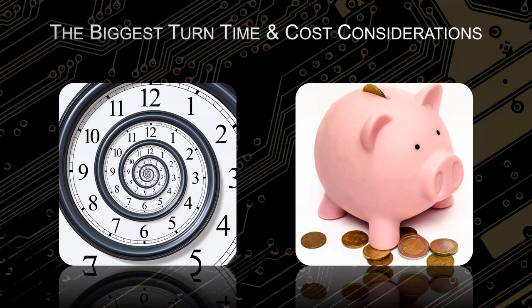Picking the right material is another one that I see here in my shop almost daily. Like Elijah said, there was a material that needed to be ordered that had a 28-day lead time. Currently at our Flex division, we have a material, our AP material, that has anywhere from an 8 to an 18-week lead time. So it can get out there sometimes. So choosing the right material, if you're able to substitute material or let our engineers recommend an alternate, equivalent material, that's probably some of the best deals that we have to offer in saving you time and money.